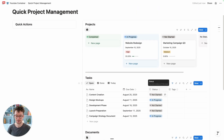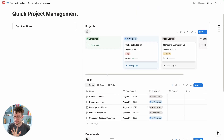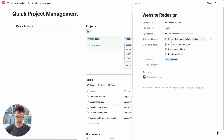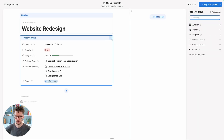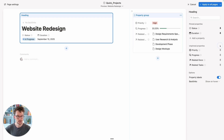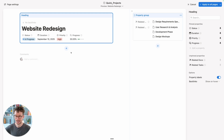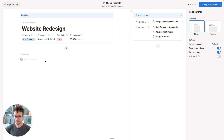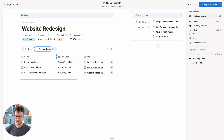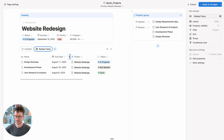Two last things Notion AI can't do yet, but which are super quick to set up. First, when I click into a project, I want a nicer look — I want to see related docs and tasks more clearly. So click 'Customize Layout', move all properties into the panel, click the heading, and pin the status, duration, priority, and progress. Then switch to tabbed view below and click plus to add related tasks — it automatically pulls in the task database with all tasks related to this project.